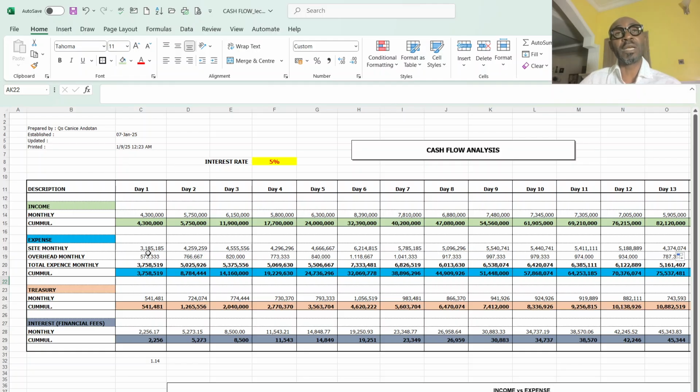I did talk about technical risk situations. You are digging, you are constructing, and you have some challenges where the columns shifted from alignment. You need to pull it down because the client has insisted you have to pull it down. You need to provide some contingency costs that you will draw from that amount to take care of such an eventuality. So those costs, you have to factor into your expense.